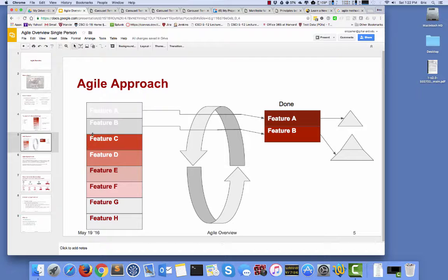All right, so we're going to work through this list. We're going to iterate. And normally in an Agile project, these iterations would be some period of time, 2 weeks, 4 weeks, whatever they are, because you'd have a team of people working on multiple sets of features, and you would time box how much work you were going to get done in a certain amount of time. Because you're working on it individually, it's just how fast can you move through these things, right?